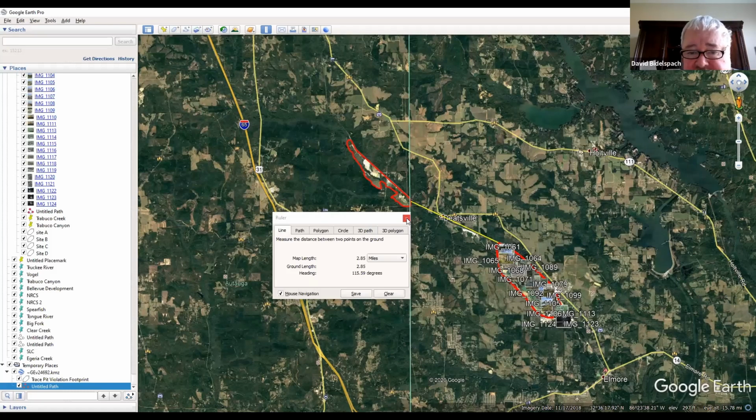So Chris has agreed to rework the RAP assessment numbers based on new acreages, based on cut fill volumes that Coffrin's doing on the ponds. So overall, I think it's going to be a much better, clear concept plan that we're going to give to them, and we're gunning for that. Sorry, this was a long conversation to get. So we want that available to basically give it to them.